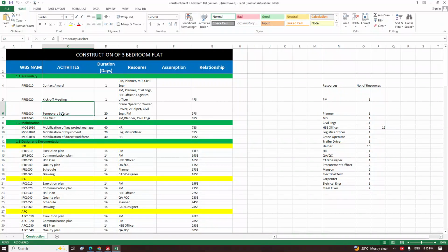If you look at our schedule, you find that we put what we call procurement. It's not for fancy. That's where we are considering the materials that we need. We're also considering when they are going to be available. That's why we schedule it in our schedule. Okay. Then having gotten those resources, we now need to schedule the people that will use those resources to deliver the job. Having gotten the people, we now need to check if there is equipment that we need.